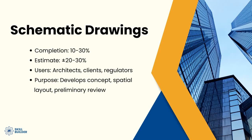When we're looking at schematic drawings, these are going to find themselves somewhere between 10 to 30, sometimes even 40 percent completion. We're going to be able to provide estimates that have a 20 to 30 percent accuracy when using these drawings, because it's going to show an overall outline or skeleton of the expectations of the project. The people using schematic drawings include architects, clients, and anybody involved in understanding the permit process or the code requirements and criteria that need to go into this project. We use these to develop conceptual layout drawings that give us a preliminary review of the intention of the project.